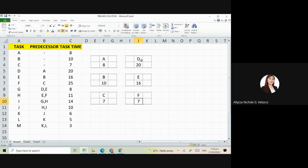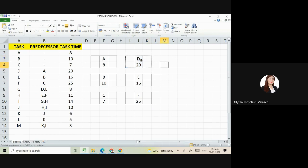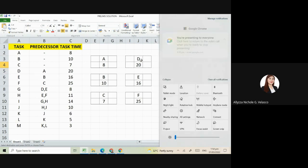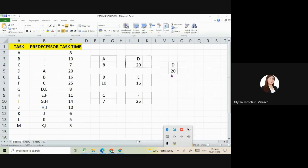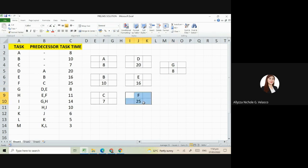Next is G. Its predecessors are B and E, so we'll place it here. Letter G having 8 days. Next is letter H. Its predecessors are G and F, so we'll place it here, having 11 days.